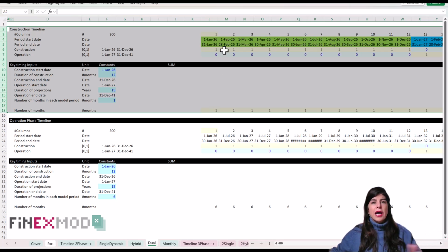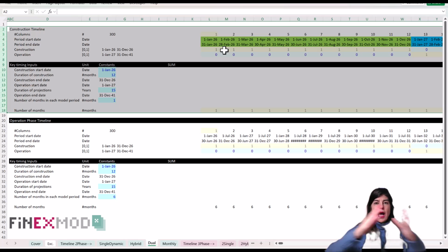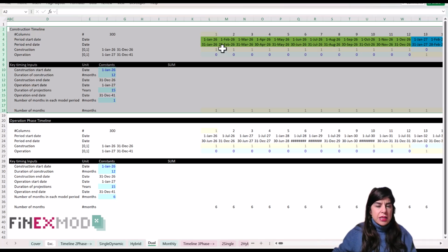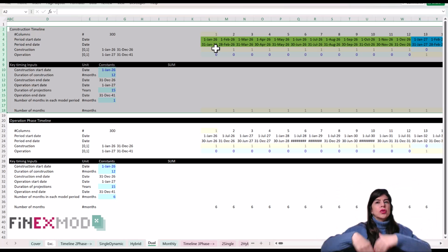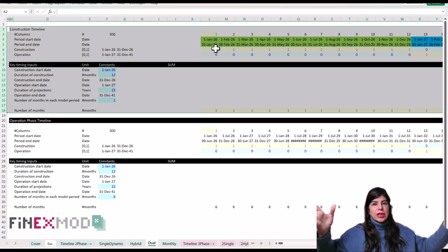So all the cash flows during construction, like drawdown schedules, the sources and uses of funds table, CapEx payment curves, and the CapEx schedules, all of them are projected on monthly basis. But then when you go to operation, you start from scratch again. You build a new timeline on semi-annual, on annual, on quarterly basis.